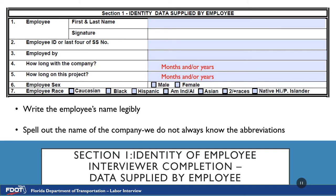Do not put abbreviations — please spell out whole names. Number 2 is Employee ID or Last Four of Social Security. There are situations in which an employee does not wish to give their Social Security number or does not know it; in these situations, please notate that they refuse to give or does not know. Number 3 is Employee By — please ensure the employee understands that this refers to their actual employer, the company that pays their paychecks, not the company they are subcontracted to.